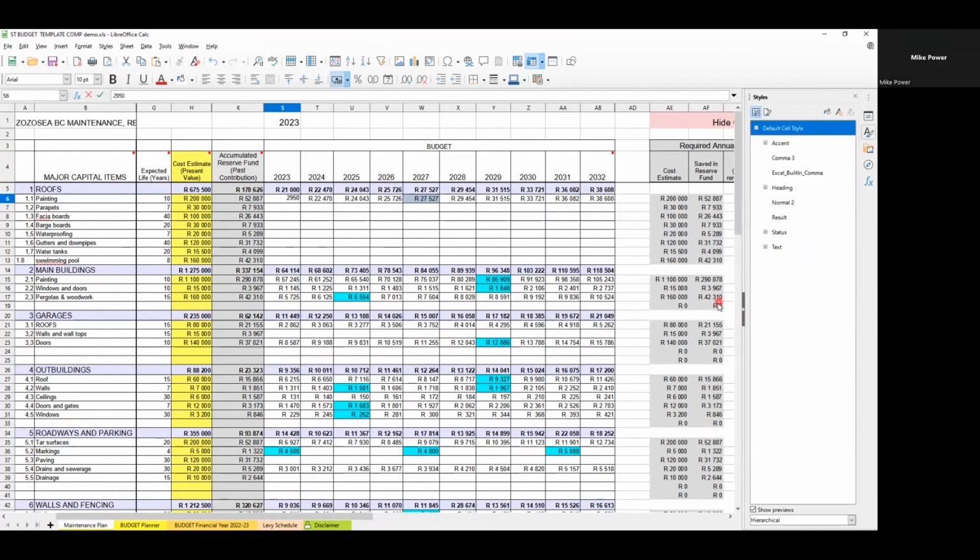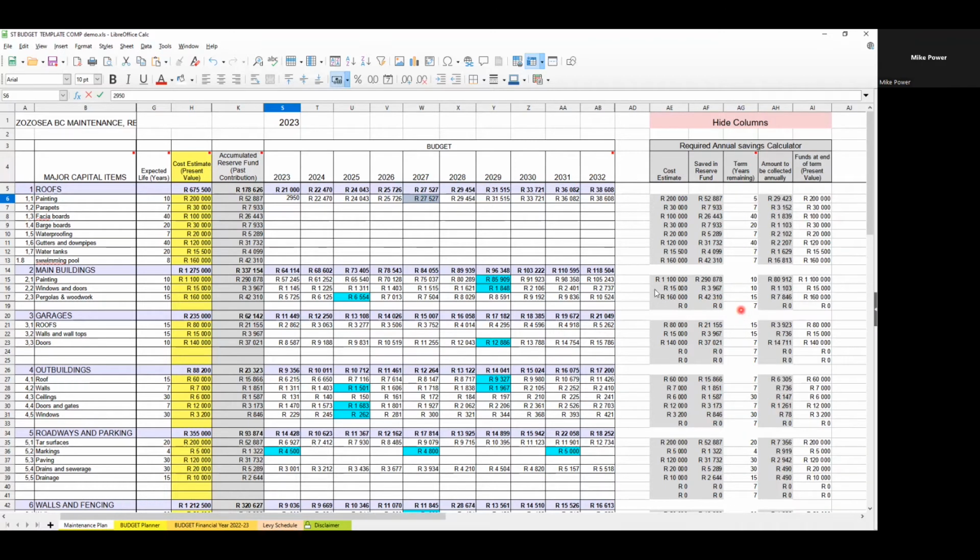29,500. Okay, that was the bit I missed last time round. I see where it's come from now. Okay. Yes, so 29,500. You can see I round it off. Okay, and then you can see, it calculates for you the next 4 years, plus the current financial year, what you need to collect so that by 2027, you will have your 200,000 Rand. Is everybody with me on this?